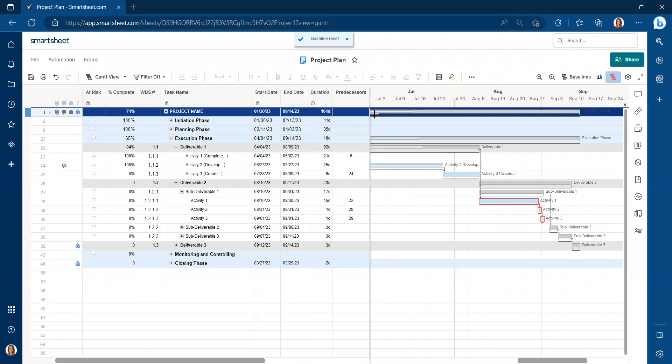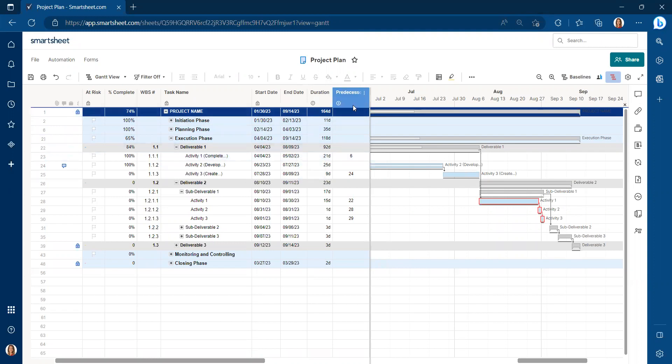When we go back and look at the baselines now, we're going to have zero variance. It literally aligned our start date and end dates, which are our actuals, with the baseline.